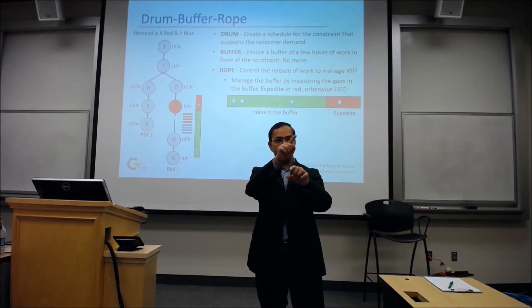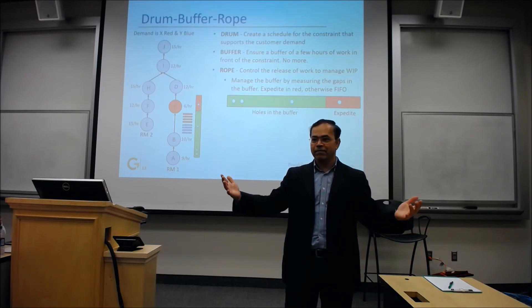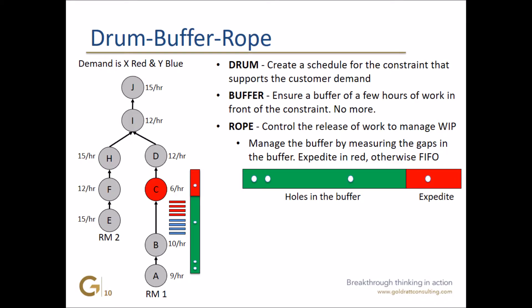When you look at it from a picture perspective, you draw boxes and they look the same. But in a production environment, the touch times of A and B are very small — you don't really have to bother about managing that time. All of the time between A and C can just be treated as buffer.